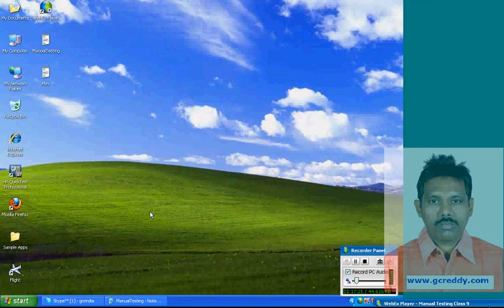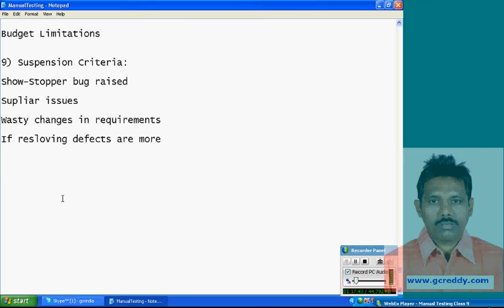If showstopper bugs arise, or we have some supplier or vendor issues, or vast changes in requirements, or if defects are more and developers are not fixing them at a fast pace, then we need to suspend testing temporarily. Okay. See the next one.